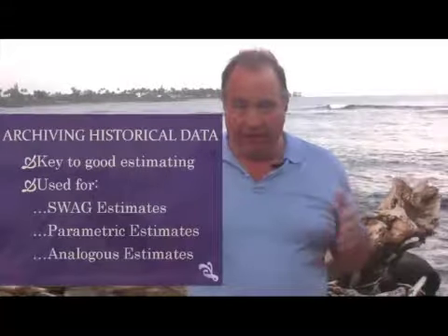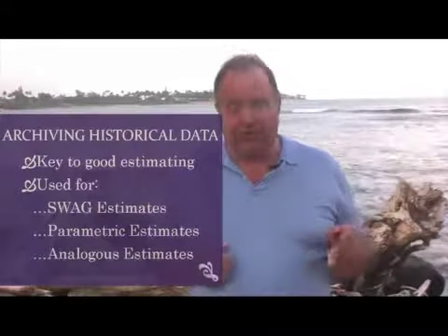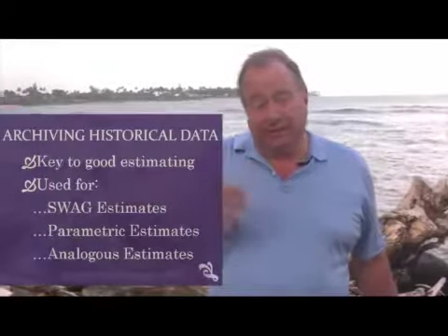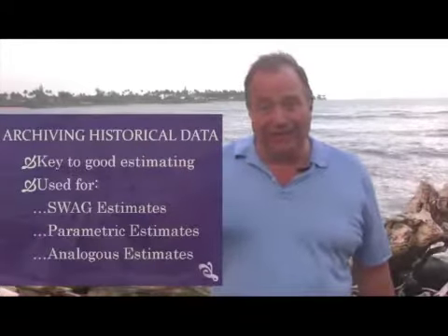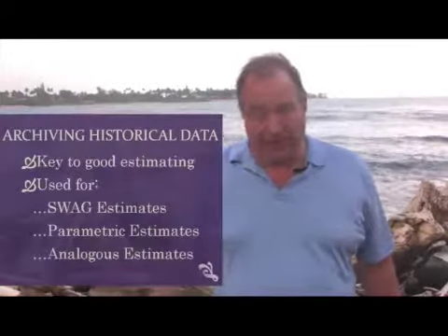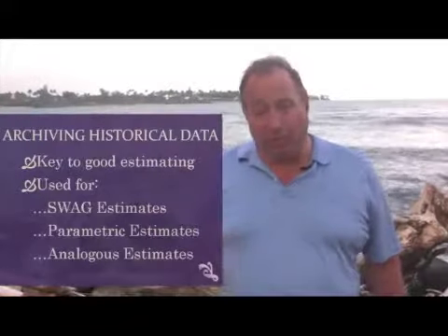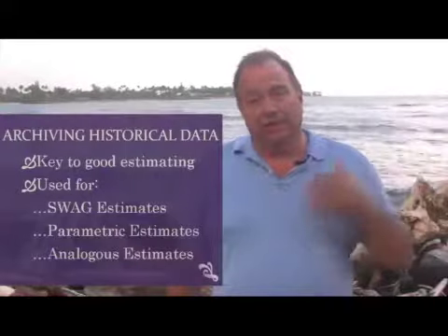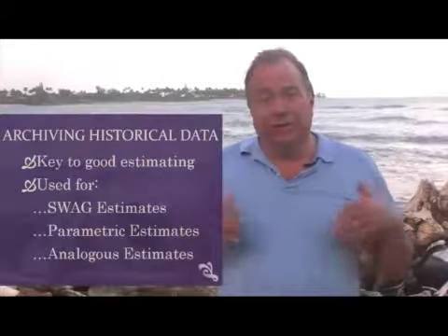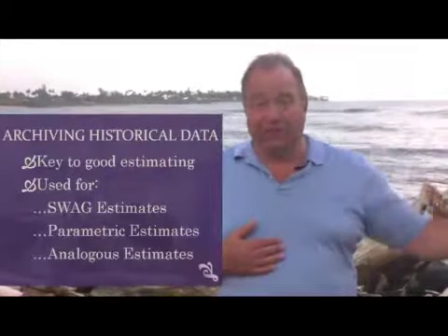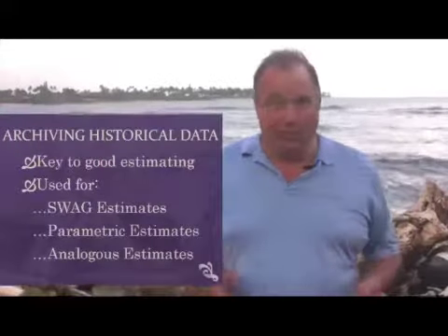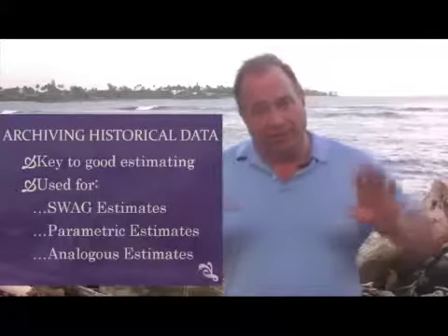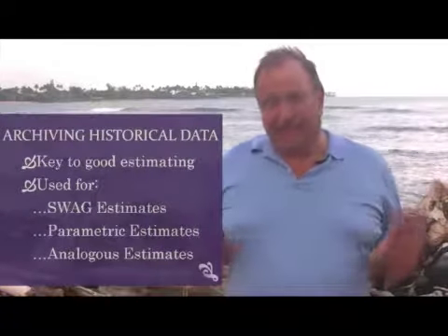And that's why the number 2 thing after you convert all your project managers over to estimating work is you set them up to start archiving historical data about every project when we finish it, so that we have this data to go look at, to use for the parametric, even SWAG estimates, and certainly analogous estimates, and we use our historical experience, what actually happened, and that's much better than relearning painful lessons project after project after project. So historical data is really the key to good estimating.